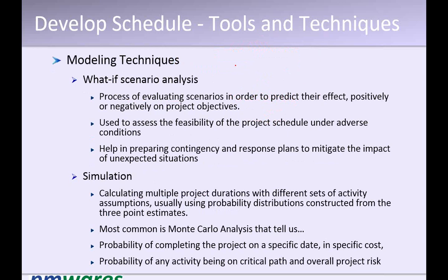All simulations are effort-intensive exercises. A lot of effort is required because you are doing end-to-end scheduling for a project 3 times, 4 times, 5 times, and then identifying which schedule will be right for me. More than that, what you can figure out is the probable budget in which I can finish the project.